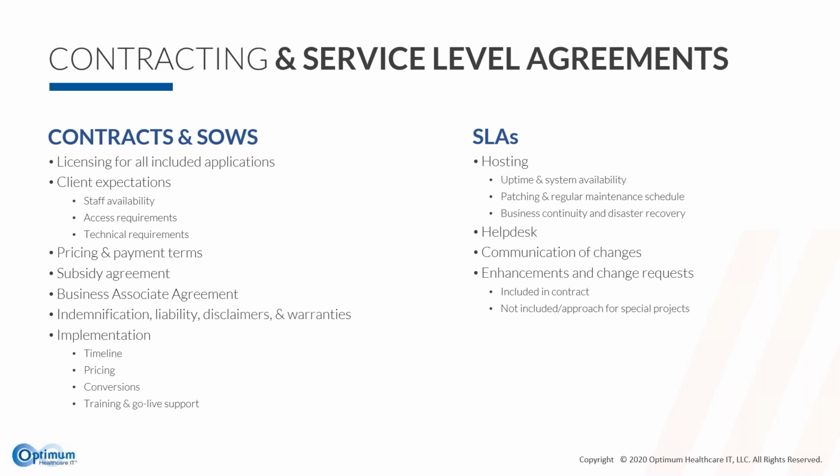So if a new order set, for example, is needed, is that a standard offering if we need to tweak one of those order sets? And if so, what do we do to get it done? If a new location, a new clinic opens up, what's the process to build that in Epic? And again, is that a standard service? Is there going to be some additional cost there, etc.?